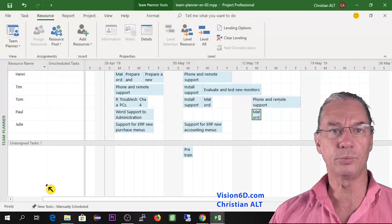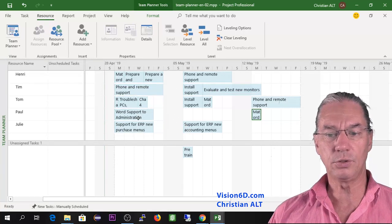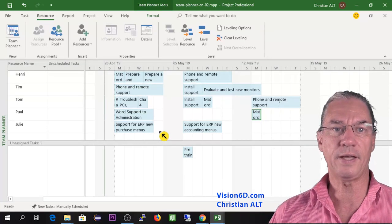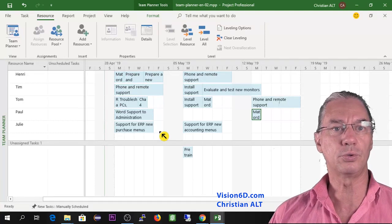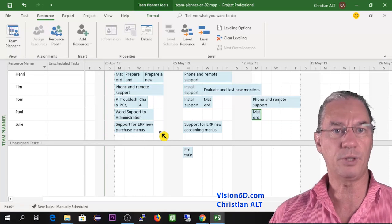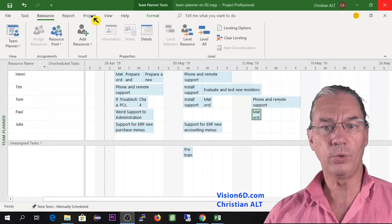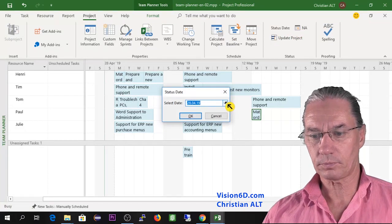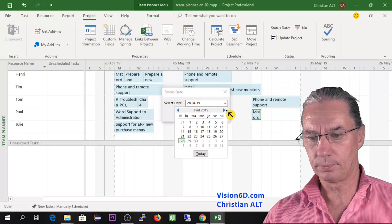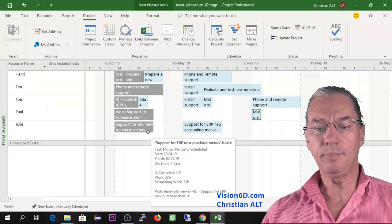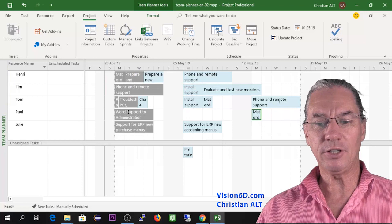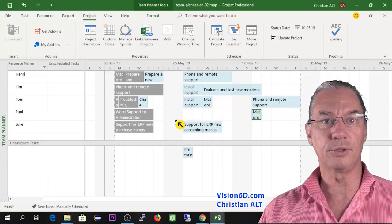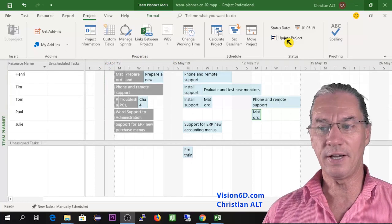This is the schedule I have for the moment. I didn't fill every gap — I always like to leave some space and margins for people, since there are always unexpected things and it's good to give people some breathing room. Now let's admit we are moving ahead in the week. I'm going to set the date to the status date, moving it to next Wednesday. Immediately the planner shows tasks in grey for ongoing tasks up to that day, and in clear blue those that haven't started yet.